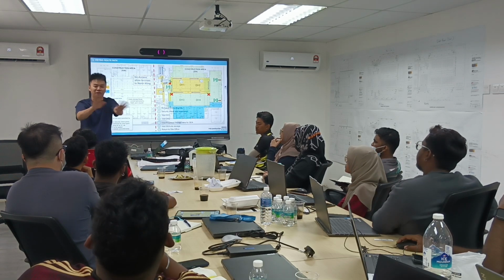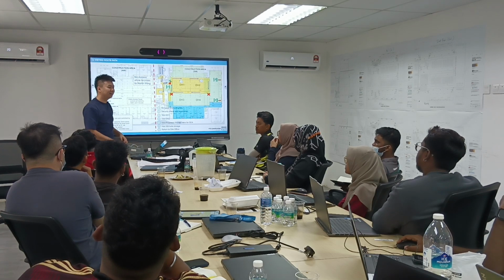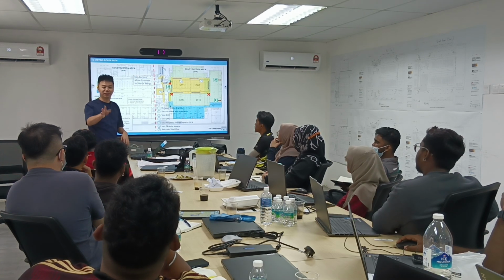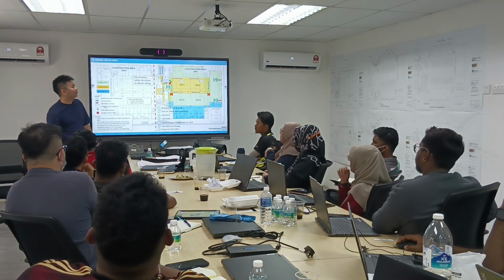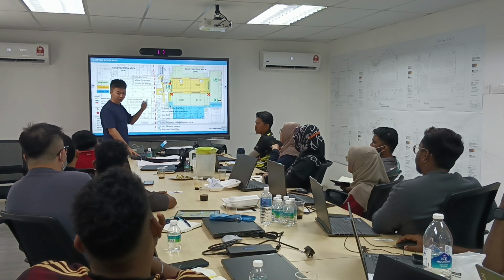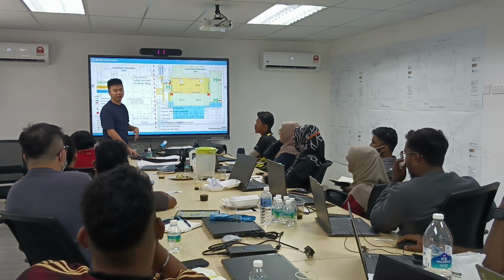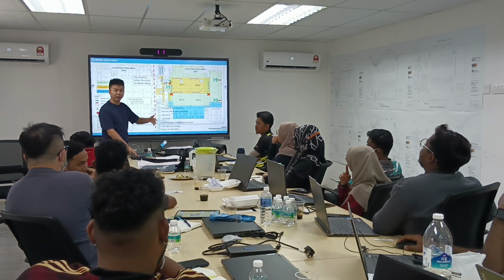But these two guys don't talk. He asked his vendor to send only, and he also asked his vendor to send only. And then you guys also don't have a logistic plan, don't have a meeting, nothing. So when everything comes to the site, everyone looks at it, wow, how to go in? Traffic jam. So this is very related to you on a day-to-day basis. That's why I also encourage people to have project meetings.